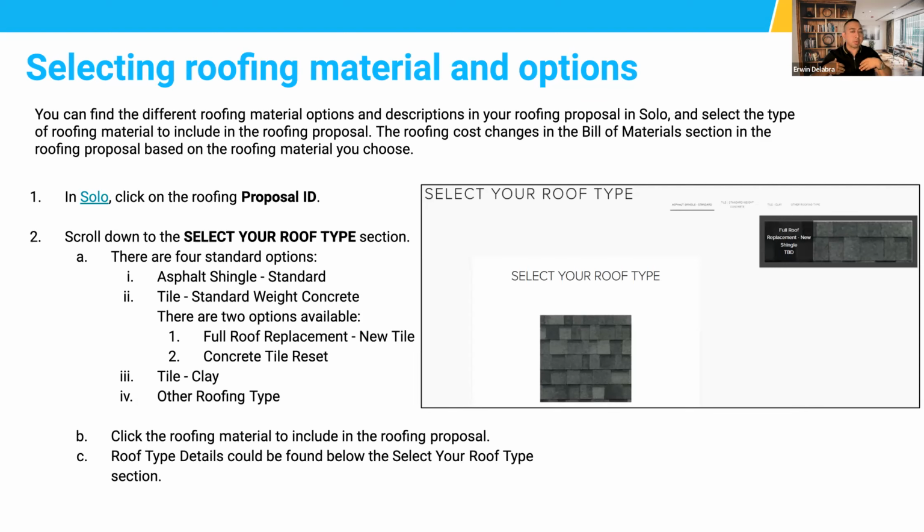And then the solar company is going to come out, install solar on the array that was based on the design. And then once they pass final inspection, our roofing partners come back out and they do the backfill. So they place the clay tiles back all around that array. And it creates like a picture frame, sunken look. So that's the clay tile comp inlay scope.